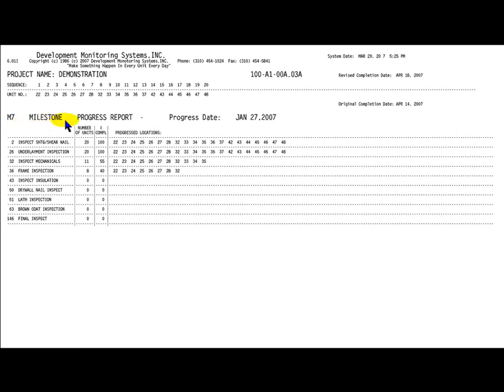The purpose of this form is to provide senior management with current progress by tracking significant milestones. Inspections were selected as the significant activity because they are absolute points of progress. Continuing work on the project is entirely dependent on achieving scheduled inspections.